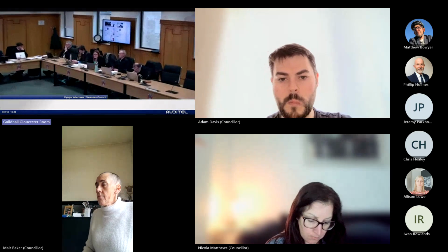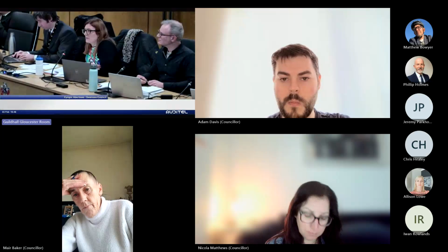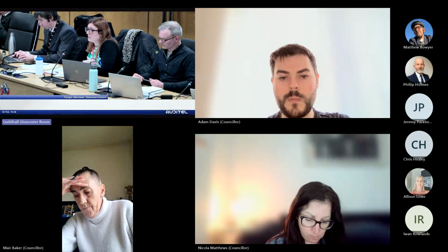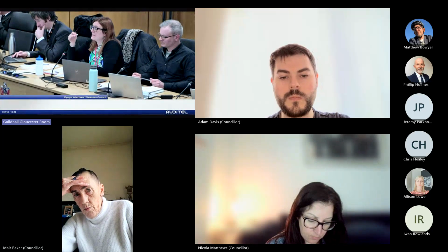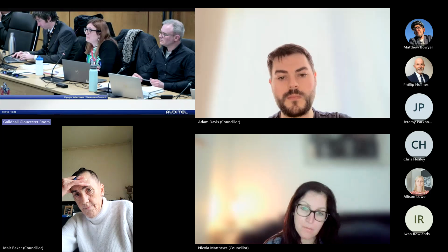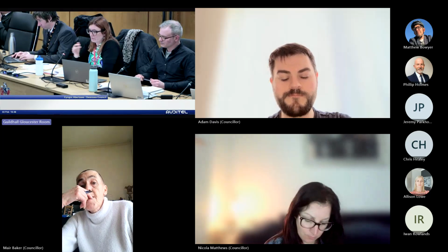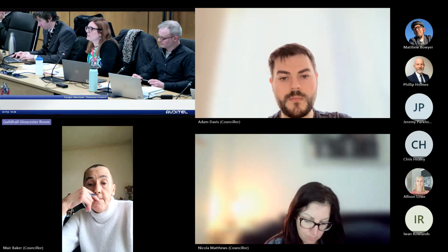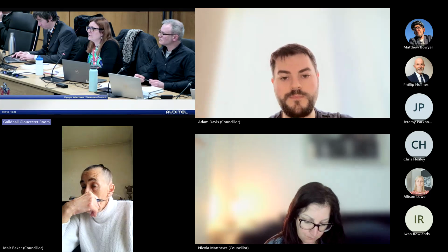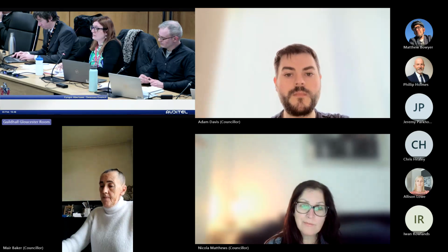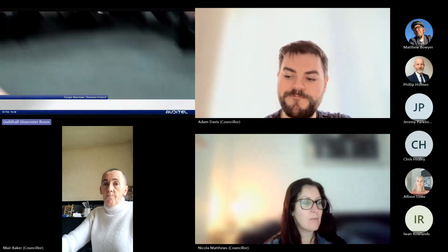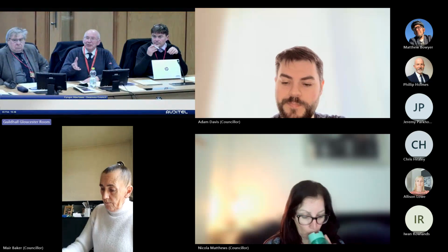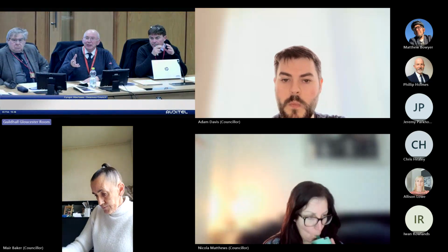Thank you, Councillor Davis. In relation to that, we can attach a condition which will request the schedule of work, so they can lay out exactly what they're doing when, and we'll have a bit of a timescale in terms of what they're going to undertake, and we can use that as a monitoring device as well. So if you're happy for that to be conditioned. Yep. Okay, thank you. But did you want to pursue the site visit, Councillor?